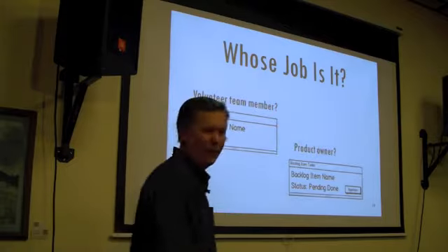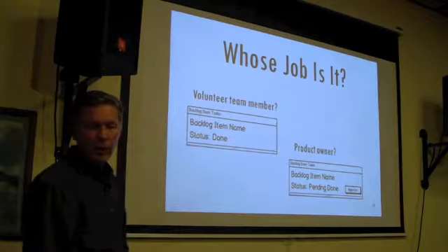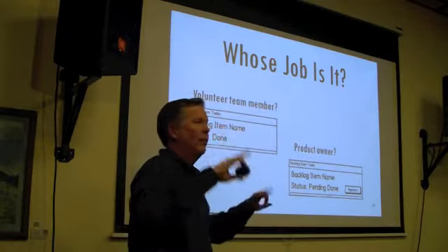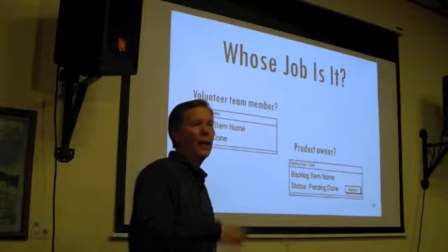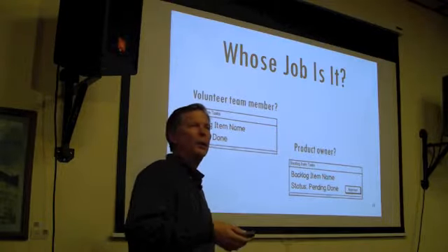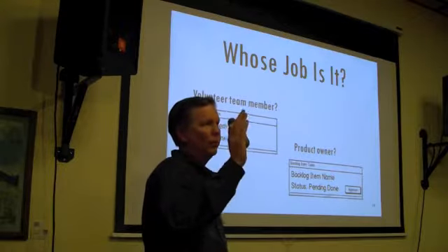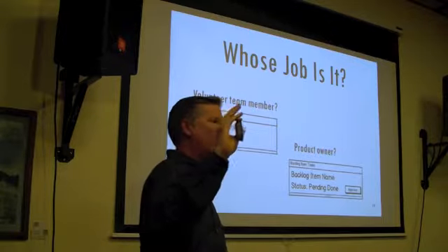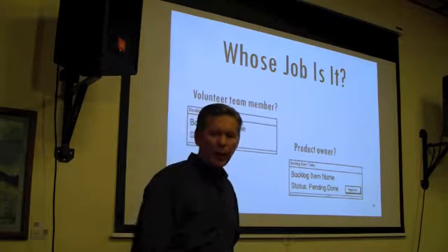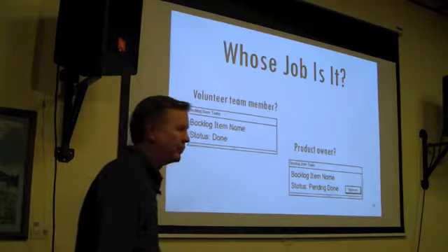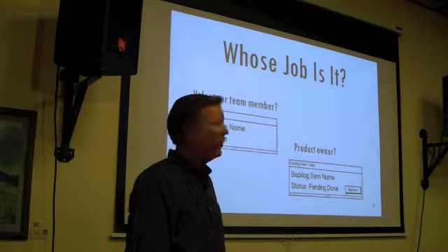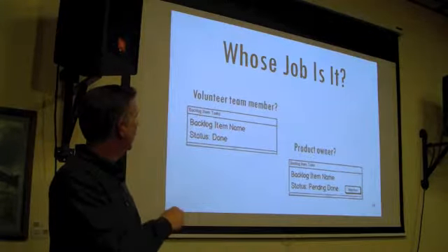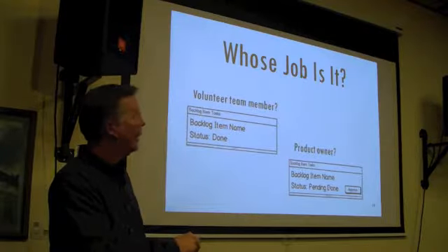Well, I guess so. Why wouldn't it be? Well, what if a product owner had to approve the doneness of this backlog item? Let's say they have to run a suite of tests. Let's say they have to actually go and view it in the UI and prove, both through automated testing and user testing, that it really is done. Then it's not the job of the team. So we could leave the status as committed, or in this case, really pending done, right?